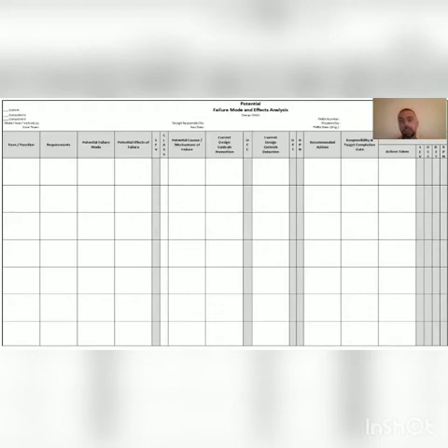Guys, please pay attention. In the FMEA chart, we cannot involve the financial factors. As you know, financial consequence plays an important role in our priorities, but unfortunately we cannot use it here. So it's recommended that the Pareto chart is used after the FMEA chart, because in the Pareto chart we can design and involve financial factors in our priorities.